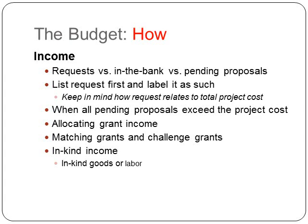You may also find yourself allocating some grant income. For example, let's say you have a program budget of $200,000, but you've only identified a potential $180,000 in direct support of that project, leaving you with a $20,000 deficit. Rather than showing a $20,000 deficit, instead add $20,000 of your operating income that you are willing to allocate to this project. That's a good thing. It shows you're putting, so to speak, your own money into the project as well as the grant income.